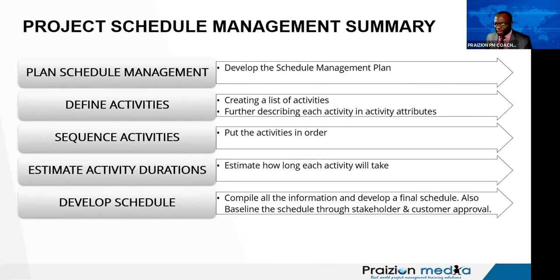There's a difference between the schedule baseline, which you are not allowed to change except with permission, versus your project schedule, which is your living, breathing schedule that you are always updating. Note, I didn't say changing, but you're always updating it to reflect actuals. You are not changing the baseline, you are changing the schedule in terms of the updates. So the baseline, the schedule baseline, you do not change that at all. But when we talk about modifying the project schedule, that is your living, breathing schedule with actuals.